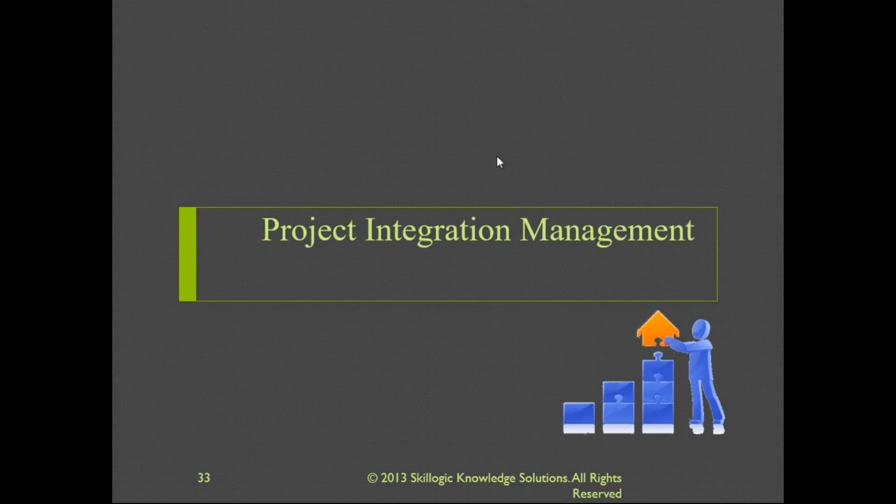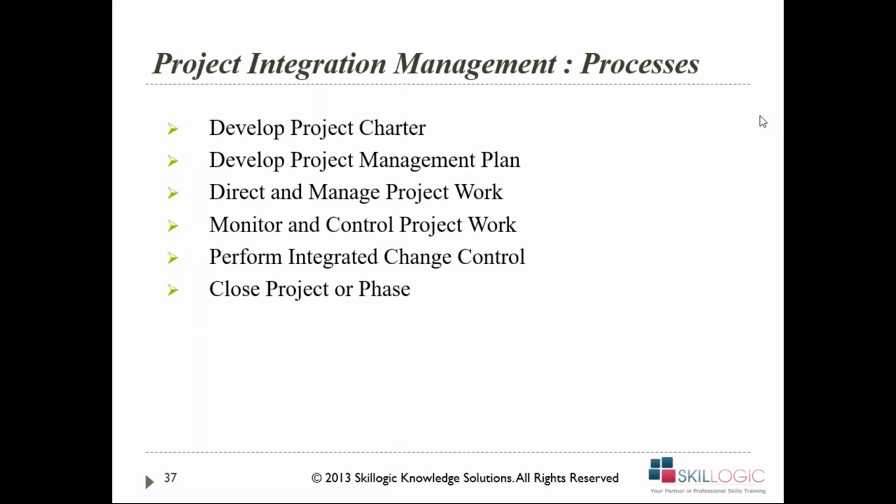So in integration management, the first topic is that we need to prepare the project charter. The project charter has the details of high-level scope, high-level time, high-level budget that is available, the statement of work, and the business case. Now this is coming from different knowledge areas of time, cost, scope, risk, all of which get integrated. That is why develop project charter features in integration management.